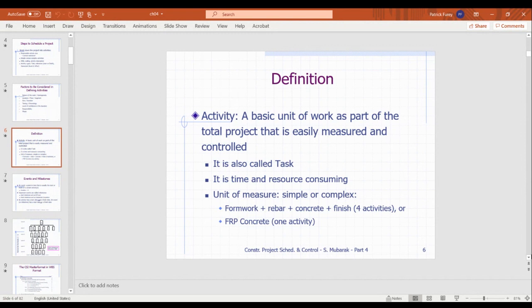a huge part of schedules. At ComEd, when I was working there and we would do construction projects, most of the time, when you had a sizable enough project, it's not one guy for three hours kind of thing, we would have to input our expected resources. I need a foreman electrician. I need three journeyman electricians. I need two apprentices on site. That was tracked for the whole company.